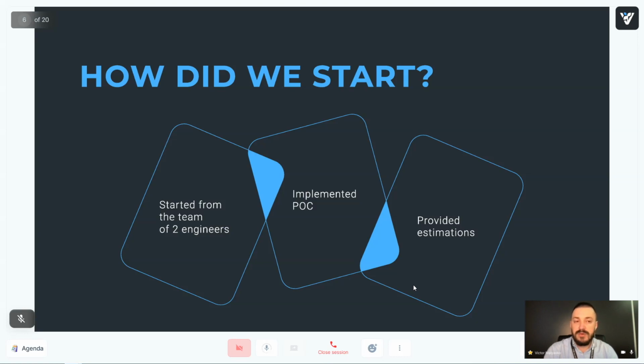The Smoke Suite consists of about 200 test cases, and having automated that, we had a chance to provide some estimations. How did we do that? All the test cases we got from TestRail, and they have a pretty good level of detail. We were able to calculate not only how much time we spent on automation of one test case, but even how much time we spent on the automation of one step, because again, the test cases have great detail. And then, using the TestRail API, we automatically calculated how much time we would require to complete the whole project.